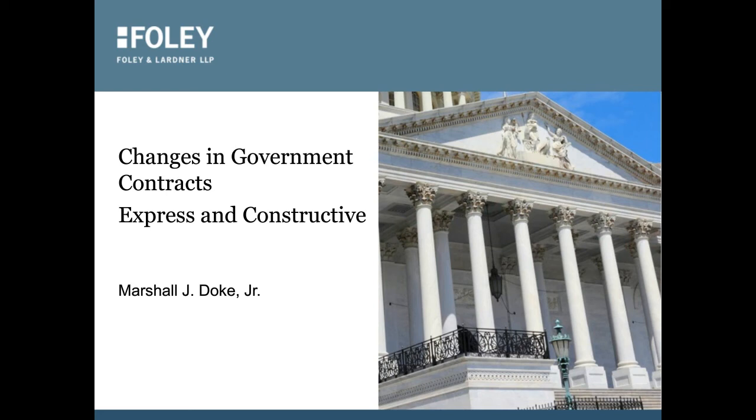Overzealous government representatives and unreasonably strict standards have been found to be constructive changes. Strict inspection is not necessarily a constructive change. The government has the right to require strict performance of the drawings and specifications. Even if it's not necessary, the government can demand strict compliance with the drawings and specifications.